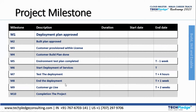Once you start deployment there should be an end for the deployment of that service. After deployment is ended, you are ready for customer go-live — the application is ready, the customer goes live, is given some time to stabilize, and then all things are handed over with a sign-off, which marks completion of the project. Start and end dates are fixed according to requirements and the team providing the solution.